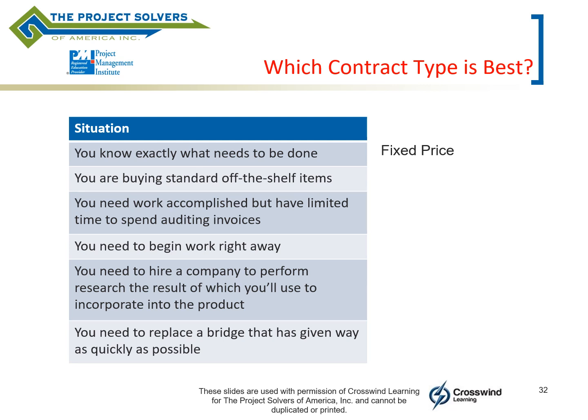What if you're going to buy a standard off-the-shelf item? What would you use? Hopefully you thought of purchase order.